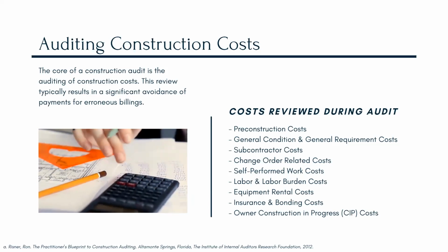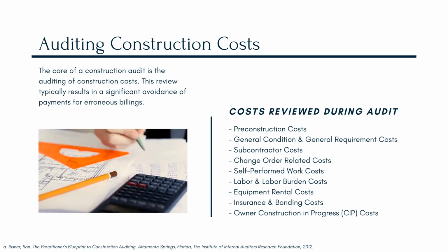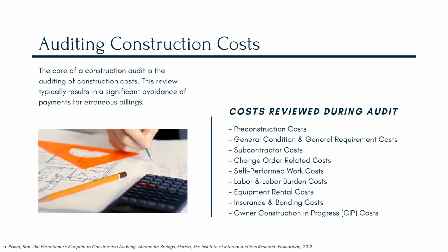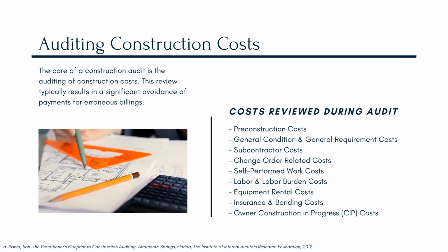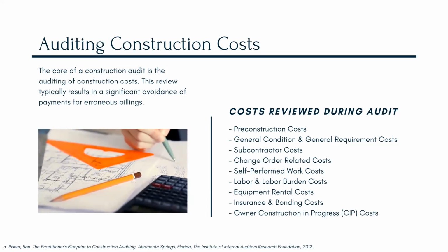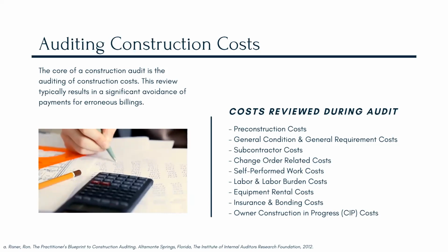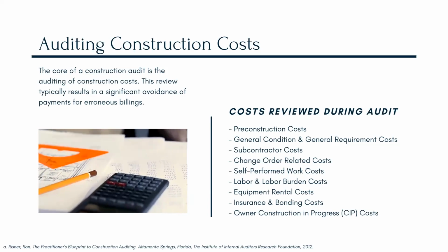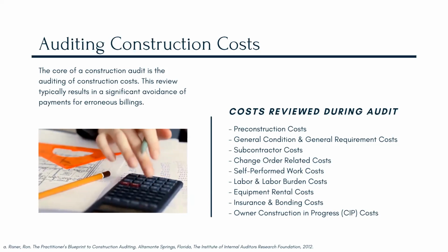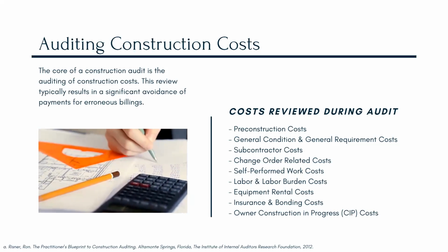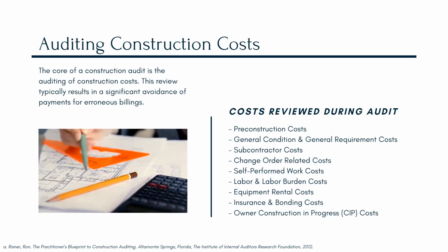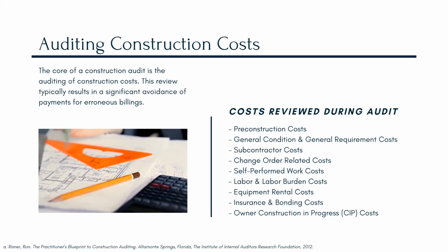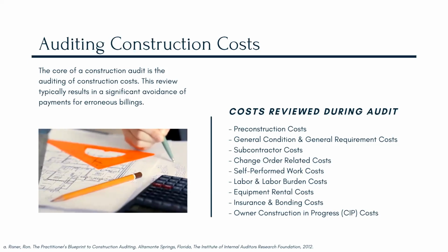And then discussions can be had on how to present those to the general contractor and recover them that way. Depending on the nature of the claim, there are insurance underwriters and other sureties, performance and payment sureties, that claim could be taken to as a third party who's responsible for those costs if it's an insurance issue.